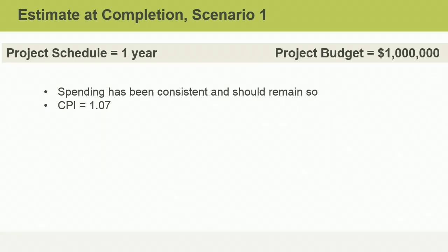In this case, you are the project manager having a conversation with a project team member. You are trying to determine what your EAC forecast should be based on project information available to date. You learn that you're pretty close to your BAC, and the same cost performance is expected to continue. The CPI of 1.07 is the cost performance index. Your original BAC is $1 million.